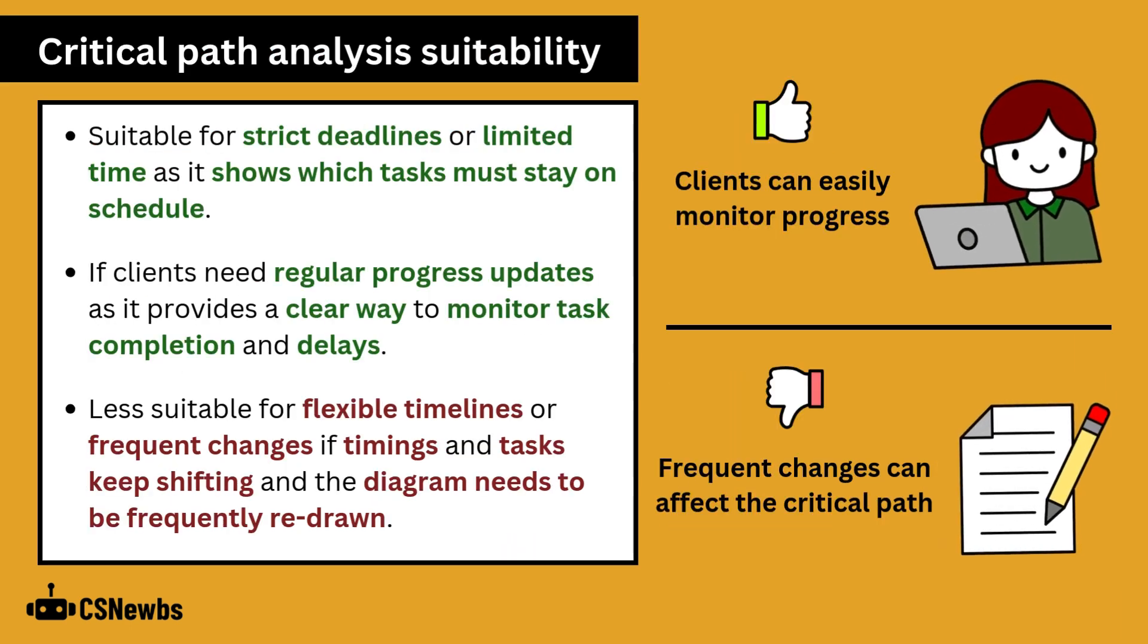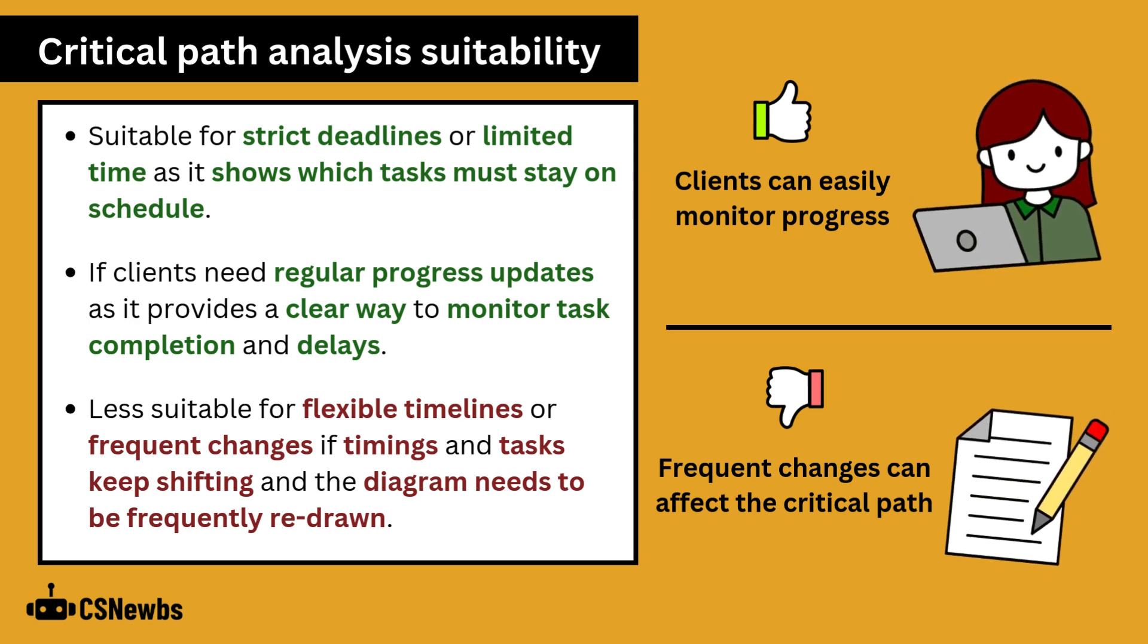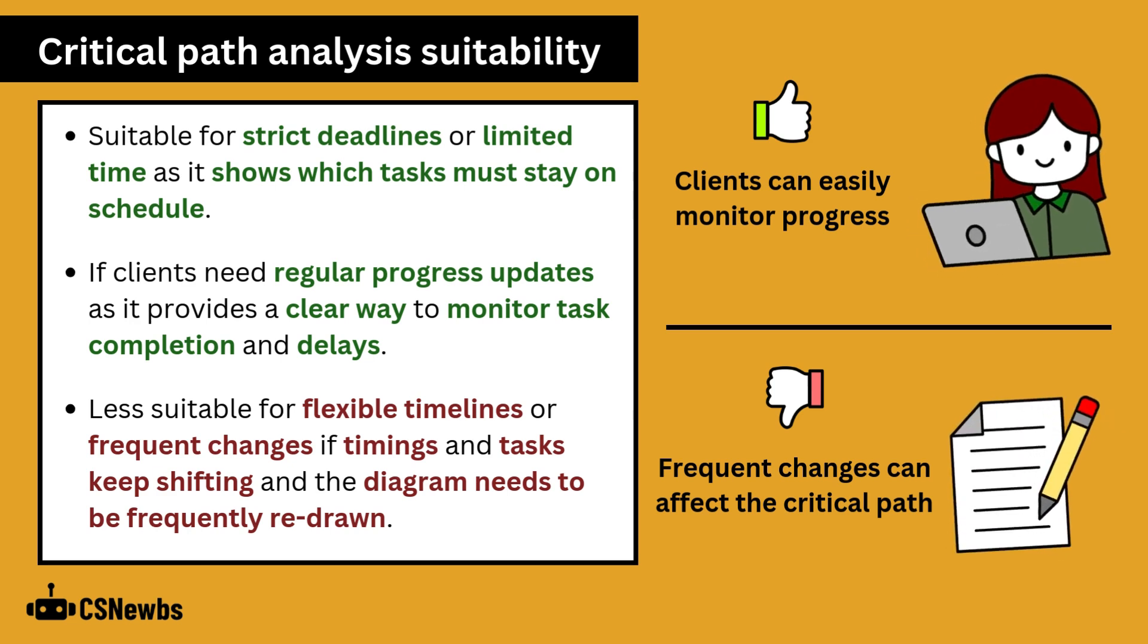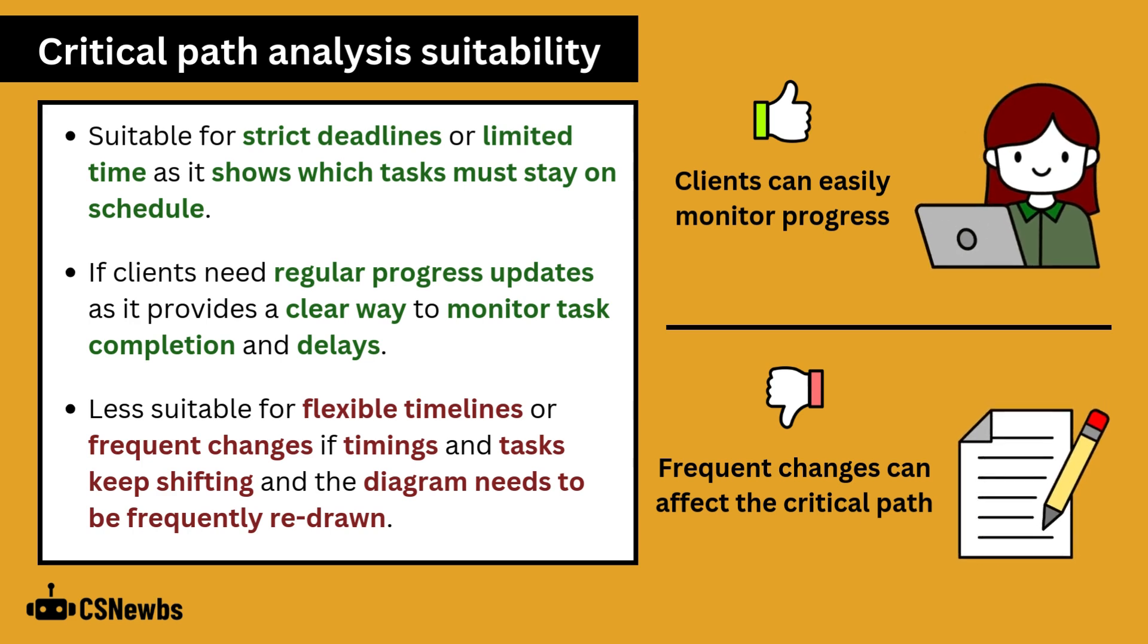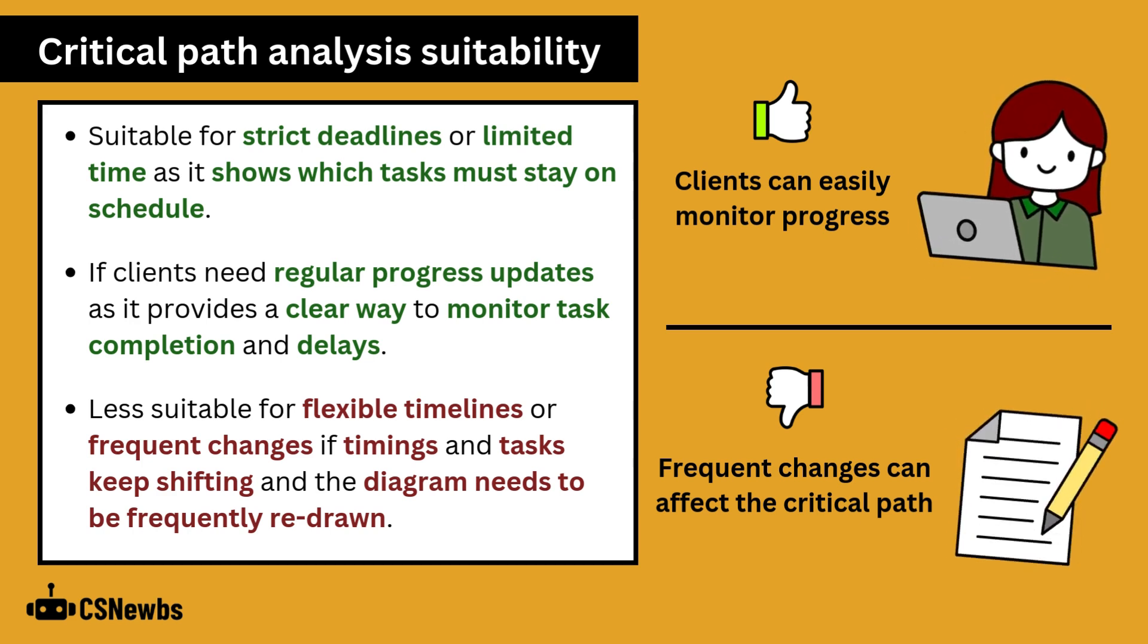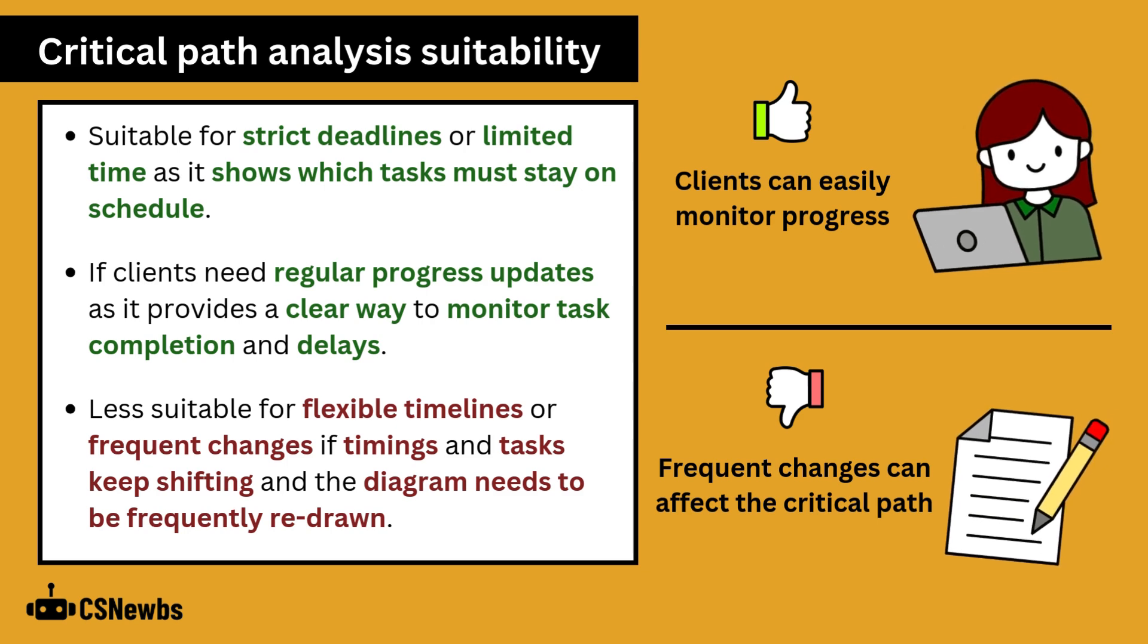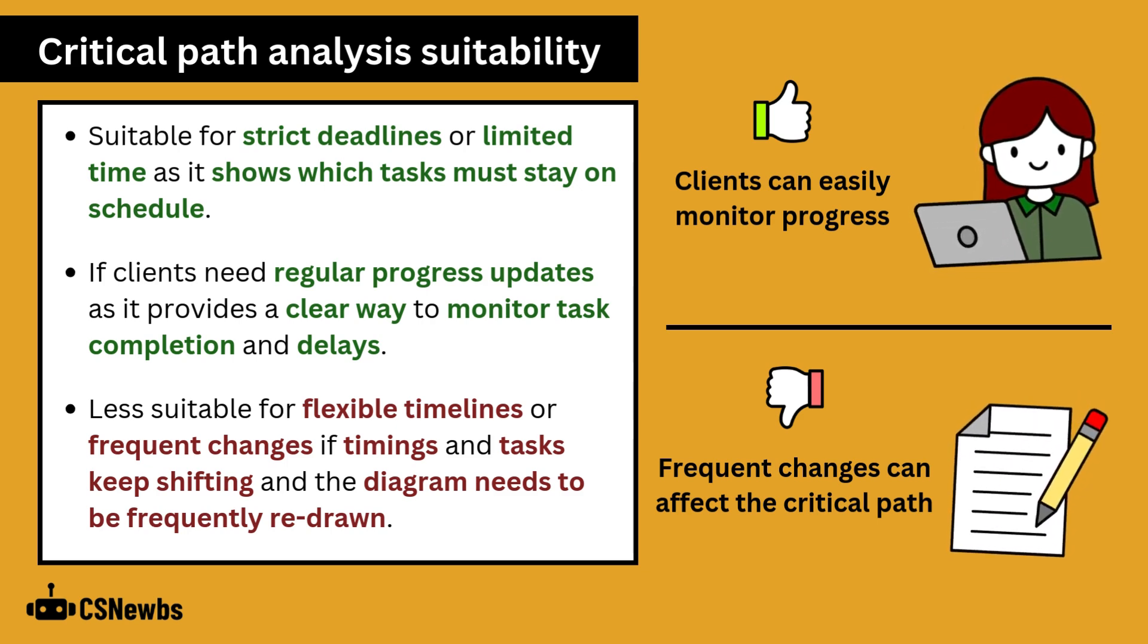So critical path analysis or the critical path method is suitable for strict deadlines or limited time as it shows which tasks must stay on schedule. It's also good if clients need regular progress updates as it provides a clear way to monitor task completion and delays. However, it is less suitable for flexible timelines or frequent changes if timings and tasks keep shifting and the diagram needs to be frequently redrawn.